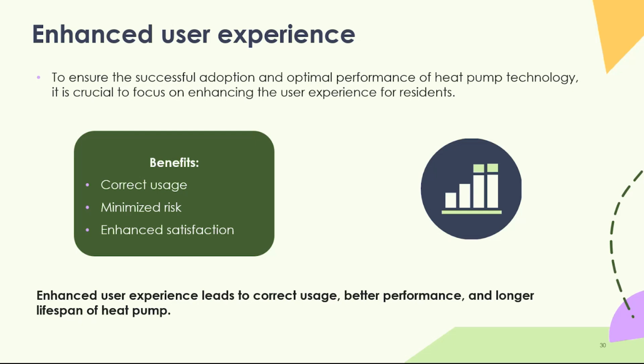Having ongoing support as well, so a customer support hotline, particularly I think in the period of time following a recent installation, having that dedicated project hotline available for a period of time afterwards to support them with any questions, issues, snagging type of things, because that's normally when those problems will crop up. It's in the months following installation, when people are still settling in and getting used to things. And then offering on-site assistance as well for troubleshooting and maintenance when needed.